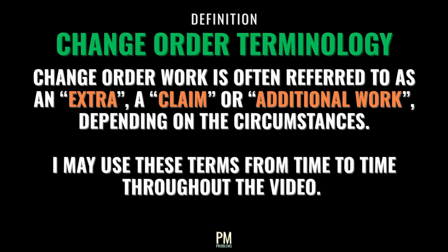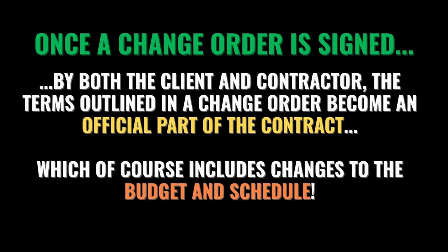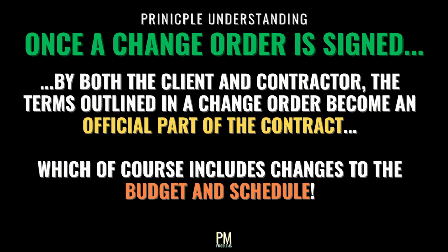Change order work is often referred to as an extra, a claim, or additional work, depending on the circumstances, and I may use these terms from time to time throughout the video. Once a change order is signed by the client and the contractor, the terms outlined in a change order become an official part of the contract, which of course includes changes to the budget and schedule, as we said before.